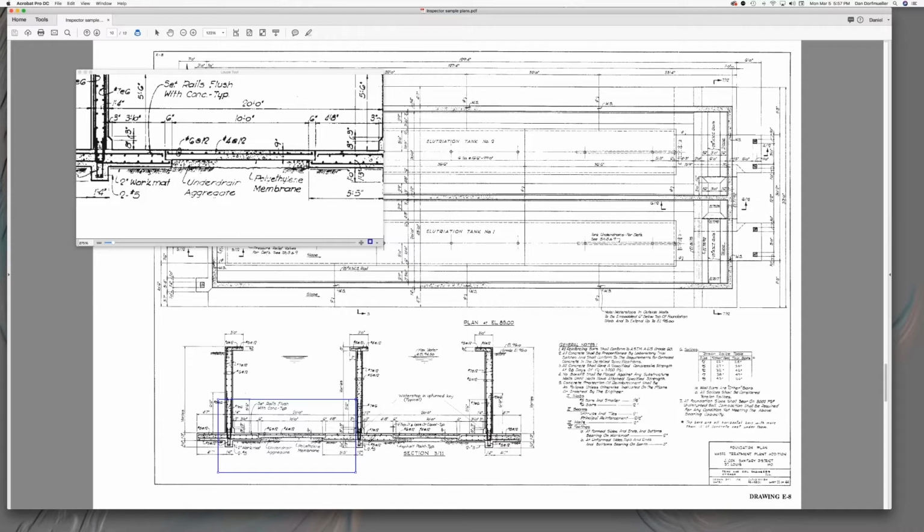Then between here and here you've got some aggregate, and over here you have a 2-inch work mat. They don't say, but the work mat looks like it does not extend across this aggregate base. It's only underneath the footings. So basically that's a vapor barrier over ABC, aggregate base course. Keep in mind, ABC is not on the drawing, so it would not be an answer. To answer the question, I believe the answer would have been polyurethane.